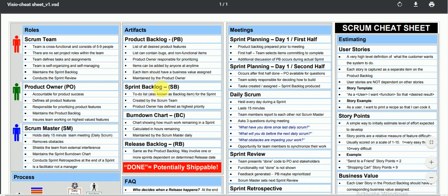Next, sprint backlog. Sprint is a word you might have heard about. Sprint is the small duration in which the entire team is going to work on particular stories. Usually, in most cases, it is a 2 weeks duration. In these 2 weeks we need to develop it, test it, showcase it to the product owner and stakeholders, and deliver. So sprint backlog is where we take high priority stories from the release backlog and put them into a sprint backlog.